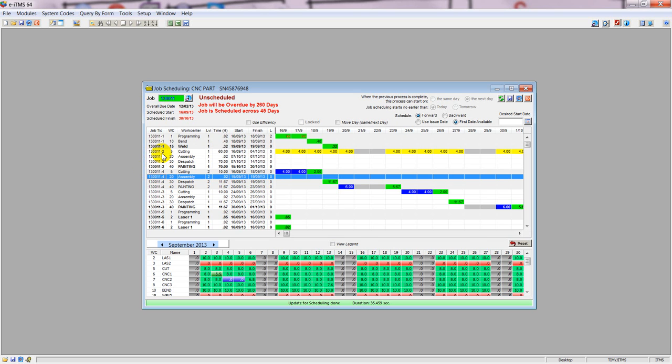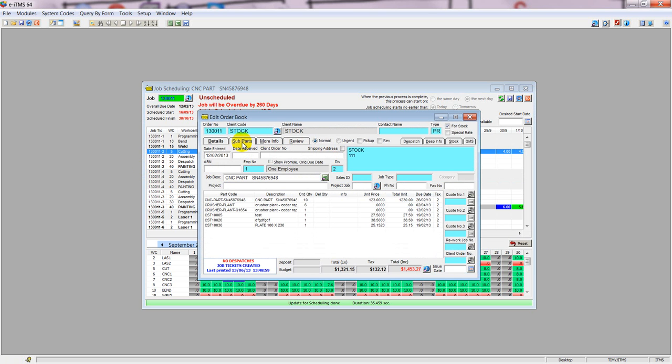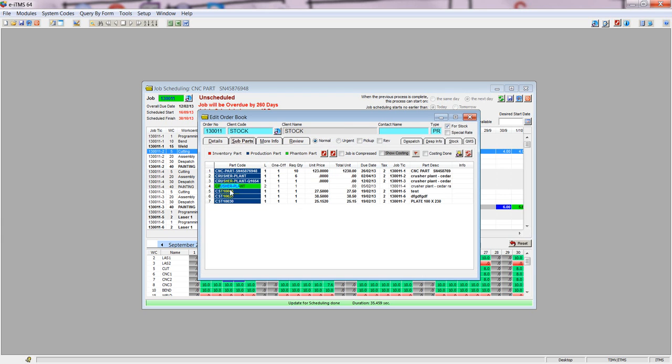If the separate tickets were subparts, well then it would most likely schedule them as though they're dependent on the other one. Okay, so those first three ticket numbers are individual parts, whereas ticket number 4 down here is a sub part of that one.